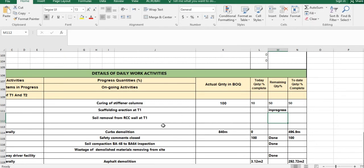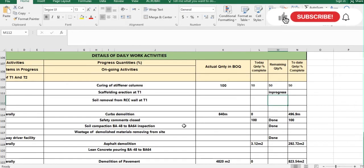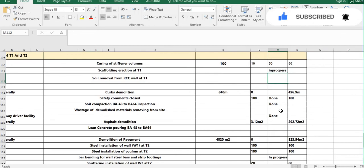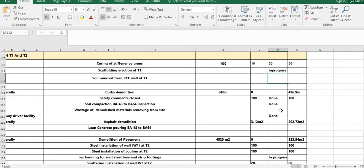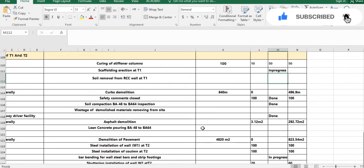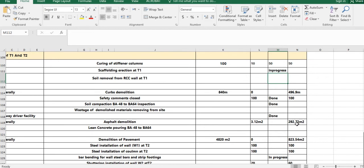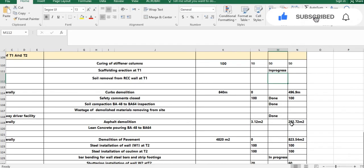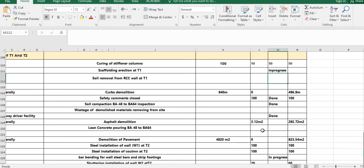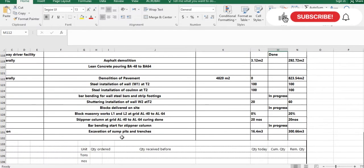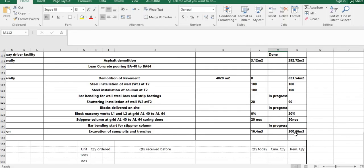Some activities are not included in the BOQ, like removal of demolition waste from site. For these, no quantity is needed since there's nothing in the BOQ — you write 'in progress' or note spot demolition counts. For activities that do have BOQ quantities, like lean concrete or excavation, you minus the completed amount from the total. For example, today we excavated 60.4 cubic meters out of a total 300 cubic meters.